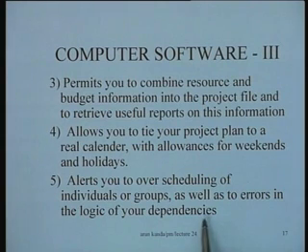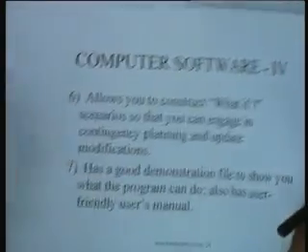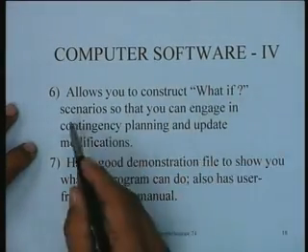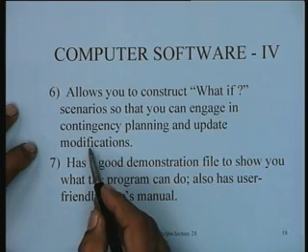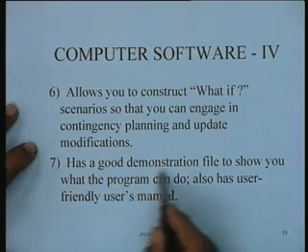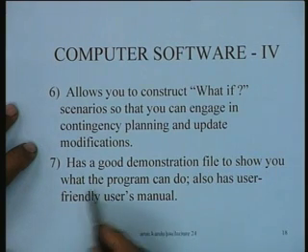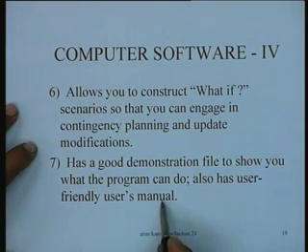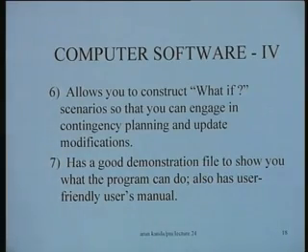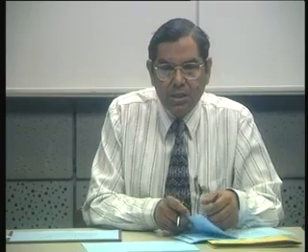Which means it should make this check on resource aggregation: you have 5 people, and if the schedule asks for 6 people at a time, it should warn you that you are using more. It should allow you to construct what-if scenarios so that you can engage in contingency planning and update your modifications. It should have a good demonstration file to show you what the program can do. It also has a user friendly users manual. That is important.